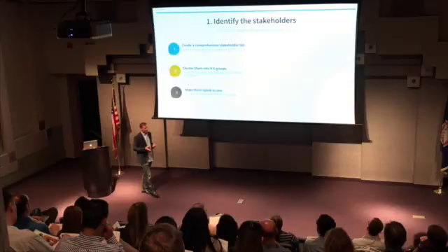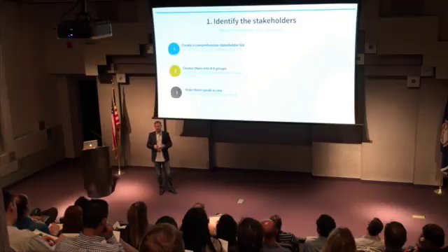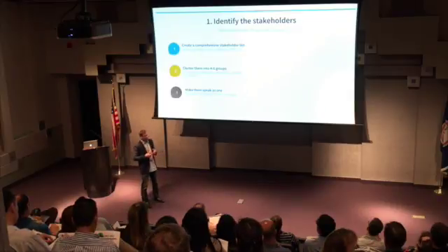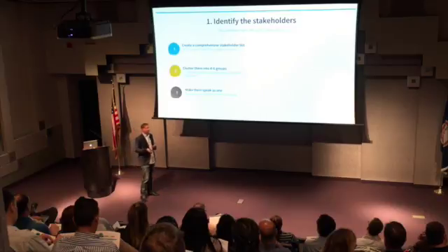The next thing I would say is cluster them into a few different groups. Just to have 14 different kinds of stakeholders, each with 14 different kinds of opinions, it honestly just gets a little bit unwieldy. And so I think you can combine things, like maybe sales and marketing gets clumped together, maybe engineering and operations can get clumped together. You can do it a few different ways, and it probably depends on your organization.